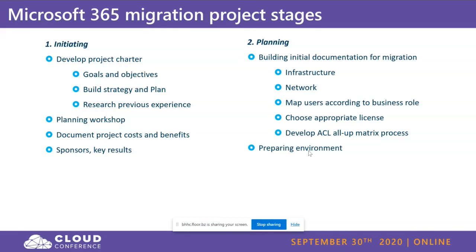Why? Because all this information has to be covered, we have to associate effort, and sometimes we have to mitigate some issues when we are migrating. For instance, we had a customer, we had planned and started the migration, and during the migration we noticed that the migration speed was very, very low, and the local server, which was a Zimbra server, had blocked.